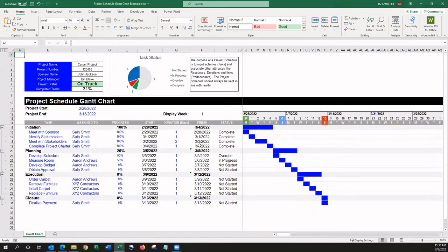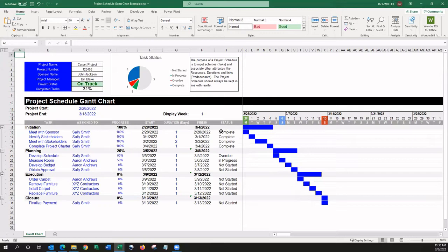And then, there's the status column over here to the right. This, too, is automatically being calculated based upon today's date, the start date of the task, the finish date of the task, and the percent complete. It's automatically calculating the status.